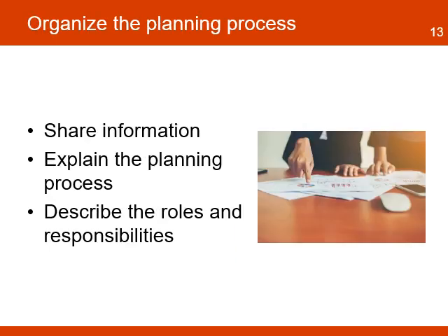In this step, the project will organize for the planning process, including the agenda for the planning session. This step begins with sharing information that participants will use to prepare for the planning session. It's important that participants are well informed about the project content, the planning process, and the roles and responsibilities during and even after the planning session. Information to share includes the logical framework, initial risk analysis, and project assumptions.